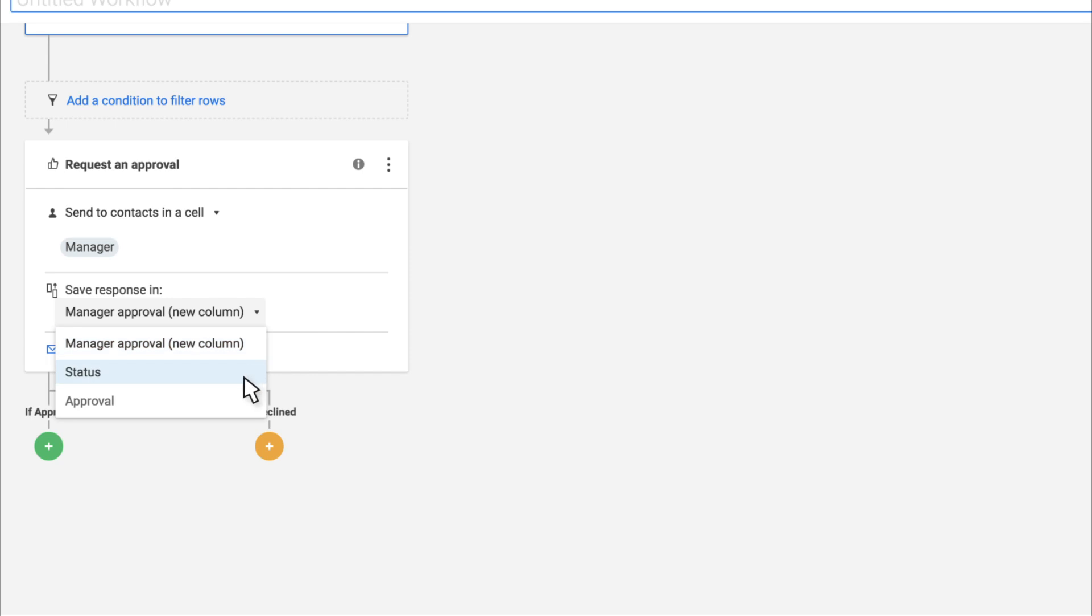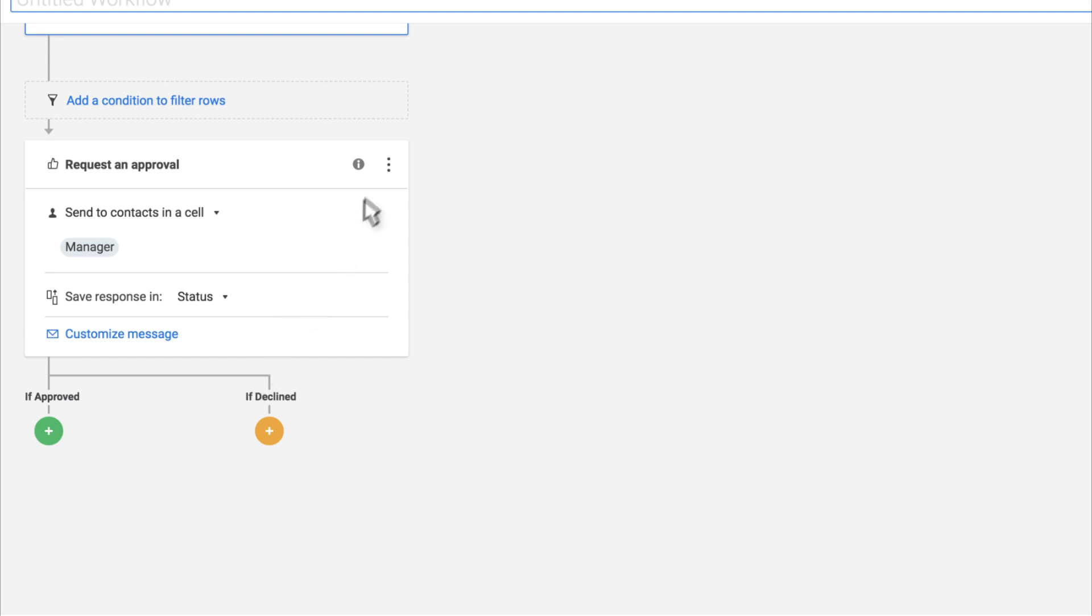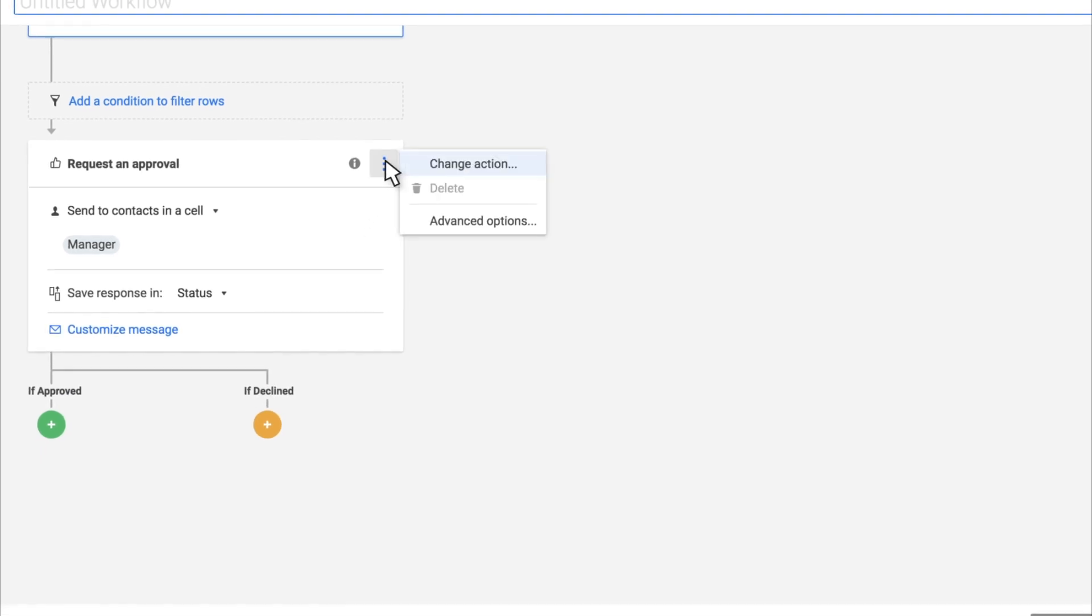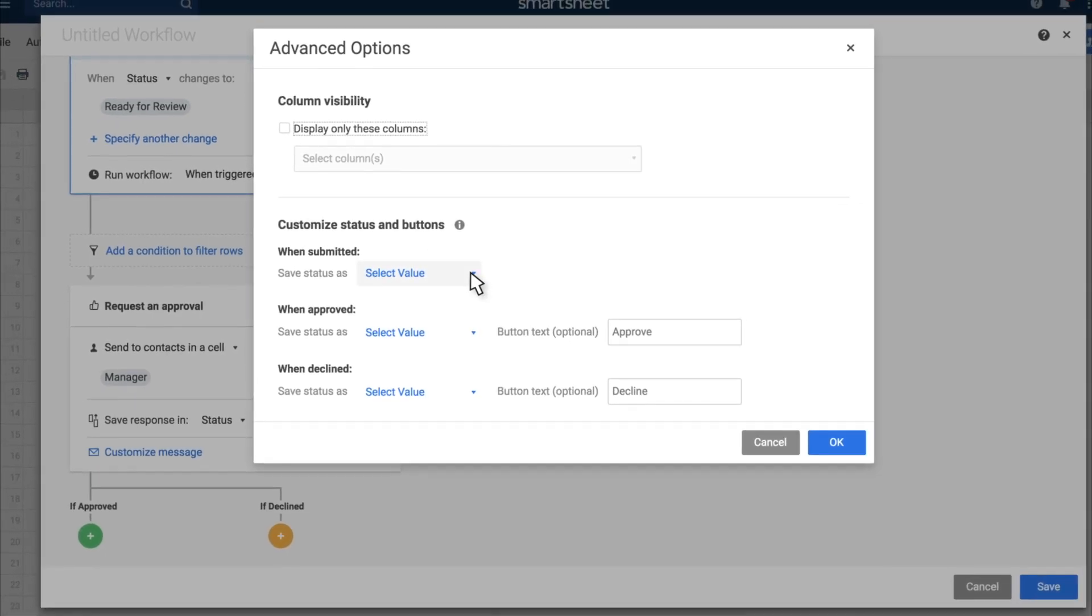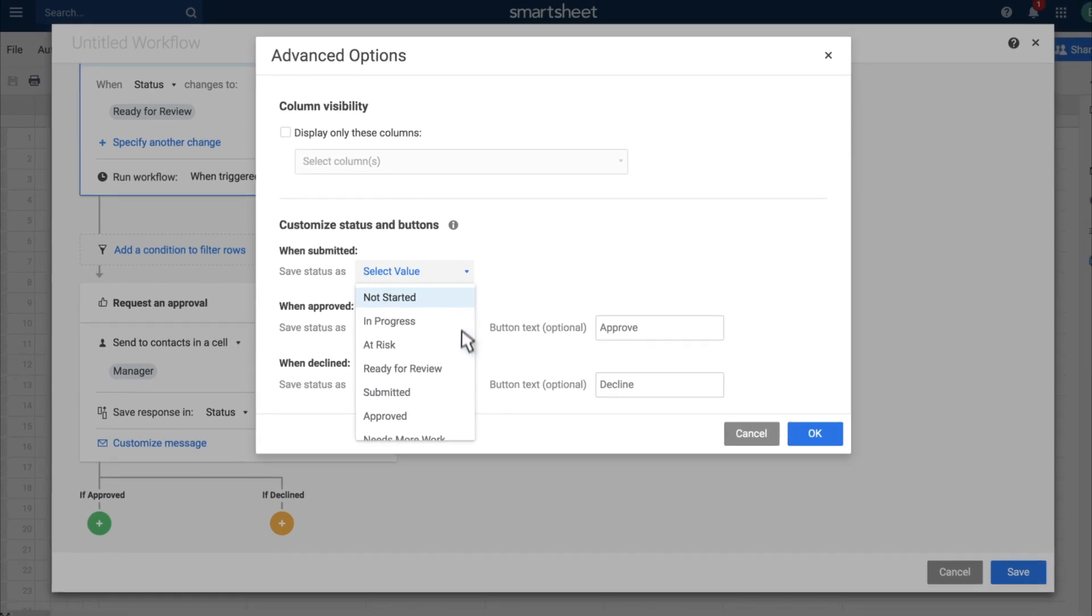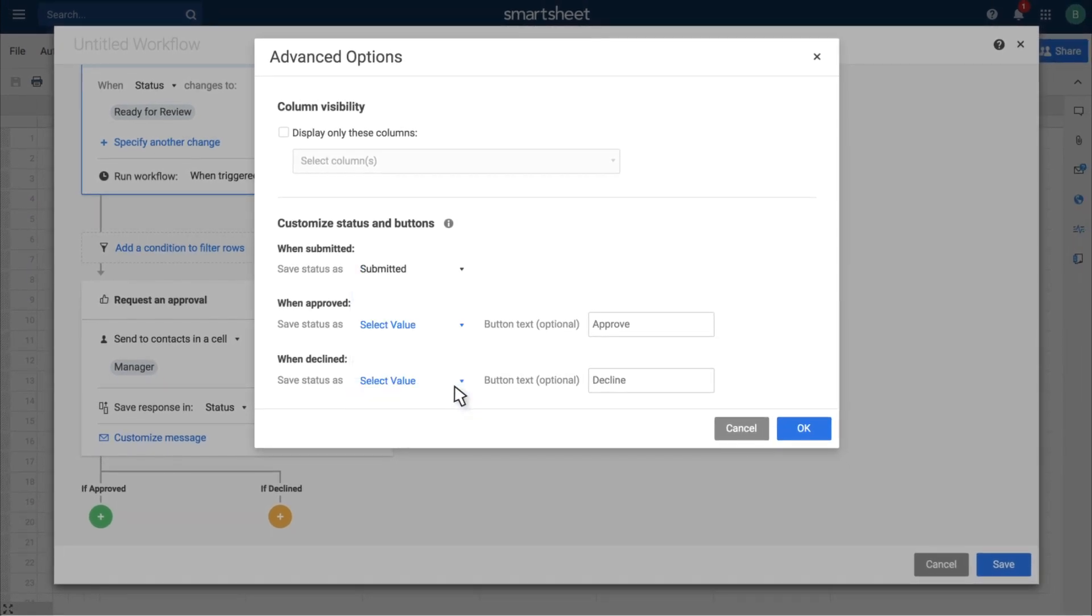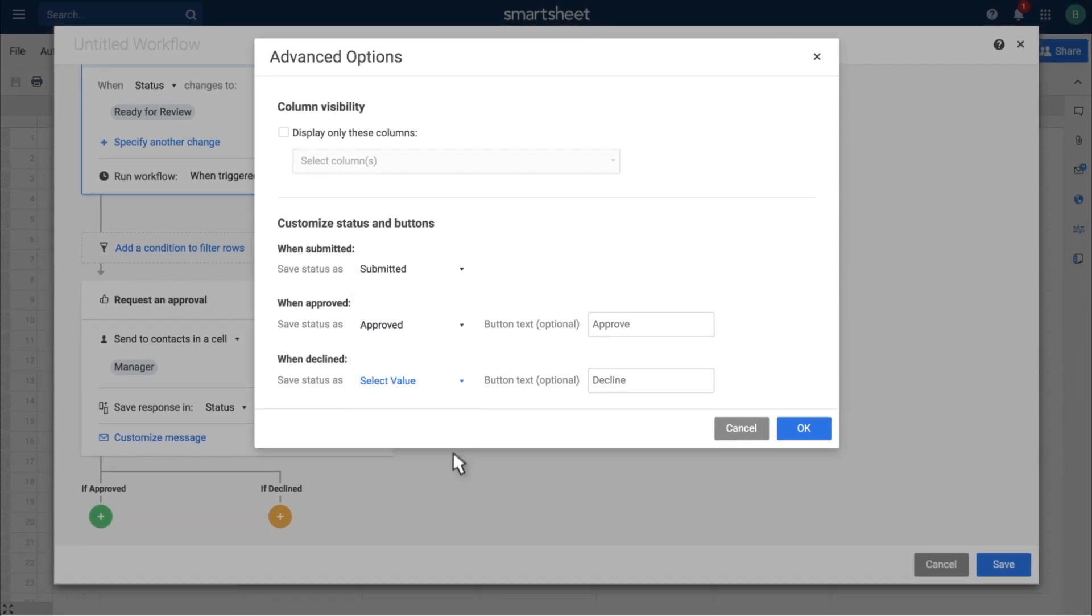If you choose an existing column, you'll need to tell Smartsheet to map the approval status to the values in that column. You can also change what text the approver sees on the approve and decline buttons.